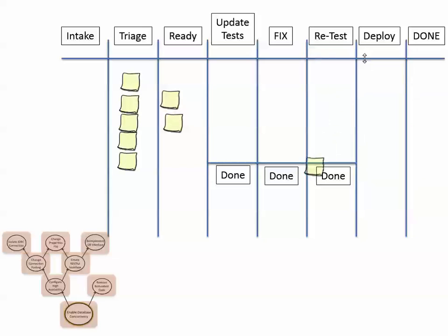So in this particular case, I can do the same one, and I've got to make sure I check off my Mikado graph too. Pull the next item over and do this same thing, right? Same basic workflow process to get me through to done over here. And once I've done that, I can now pull over this next item that's down below, because I've gotten rid of the prerequisites. I can now say that it's ready.